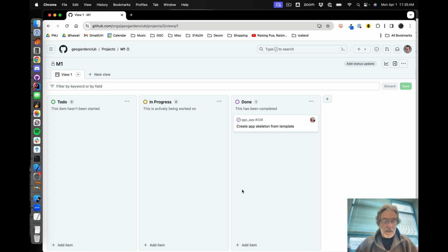And there you go. So that covers creating items and assigning them to people. In this case, this isn't a valid issue-driven project management board, because for each person on the team, there should be at least two issues in the to-do column, and everybody should always have one issue assigned to them. But you can see the basic steps for setting up a board.